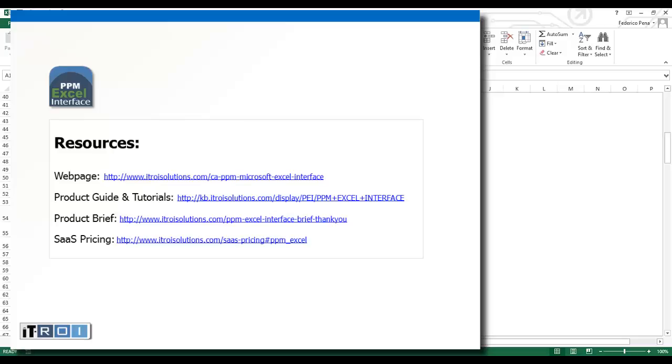All right. Can periods be added in Excel for cost plans? Same question for resource allocations. Can you add periods? Well, for resource allocations, no, because resource allocations basically go from project start to project finish. So if you wanted to change the length, you would just change your project start or project finish, the same way that out-of-the-box Clarity functions. It doesn't allow you to add time periods outside of your project start or finish. So although yes, you can do it, you wouldn't do it at the allocation interface, you would do it at the project interface. And I'm sorry, what was the other one?